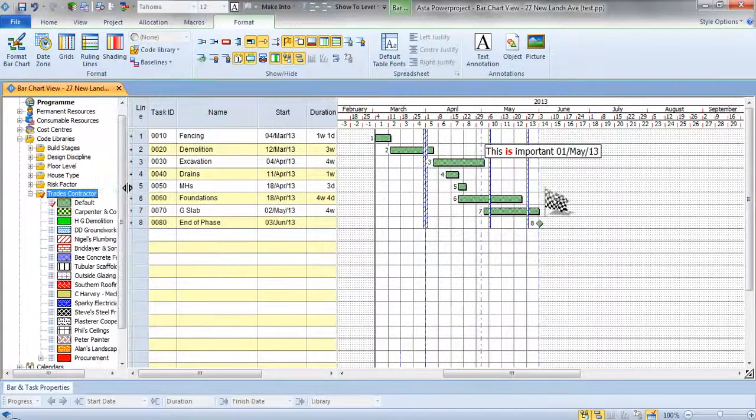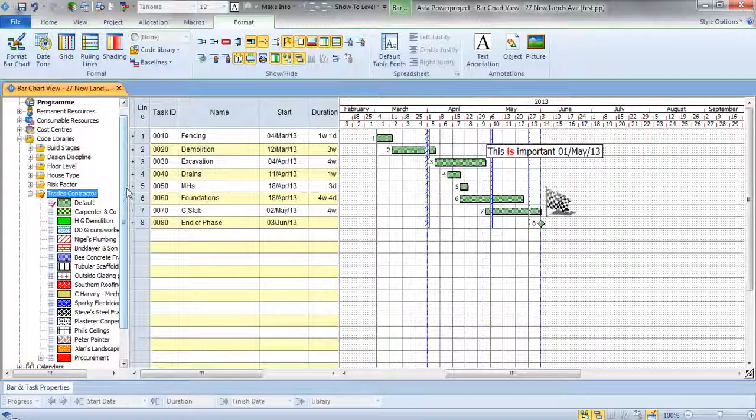So in this particular case we're not going to carry out the work ourselves, various other people are going to do it on our behalf, and we can take an organisation from this list where we've preset an appearance, and we can drag and drop it onto an activity, and then we can see visually, colourfully, which organisation is carrying out these different activities.